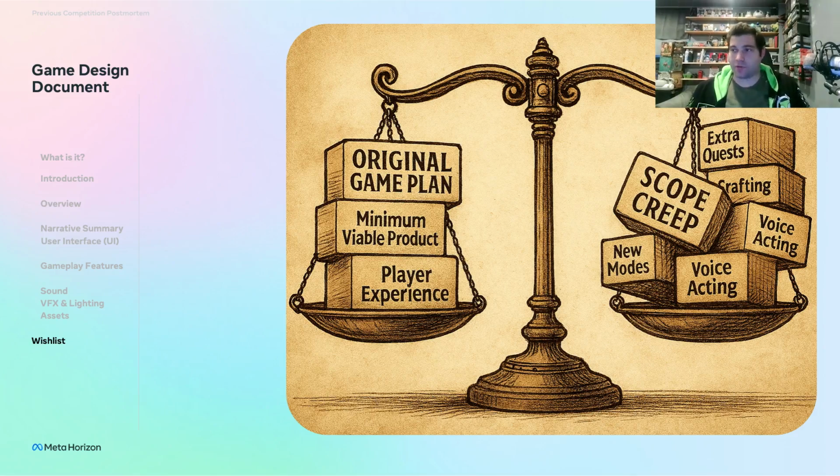The reason for that is there's three priorities of tasks. You have core, which is priority 1. If your core ain't done, don't work on priority 2. Priority 2 is all the systems that aren't core that are required for the world. So your progression systems, your UI, stuff of that nature. If it's not required for core, it's priority 2. And priority 2 can wait. Get your core done, work on priority 2 systems, and then once priority 1 and 2 have been QA'd, they've been tested, then you start working on priority 3 wish list items.